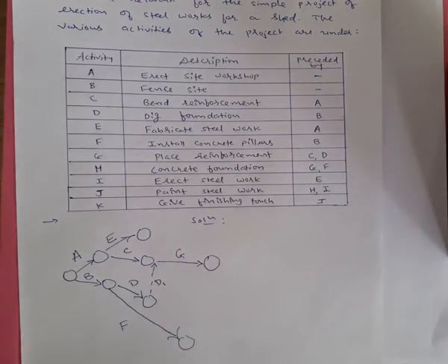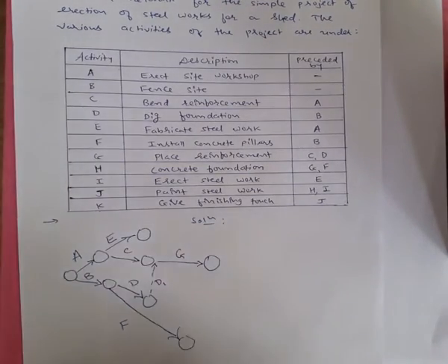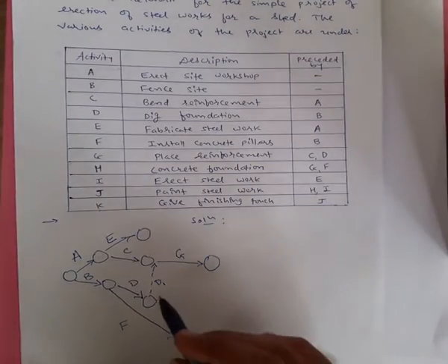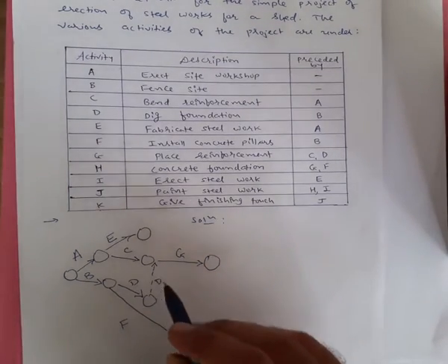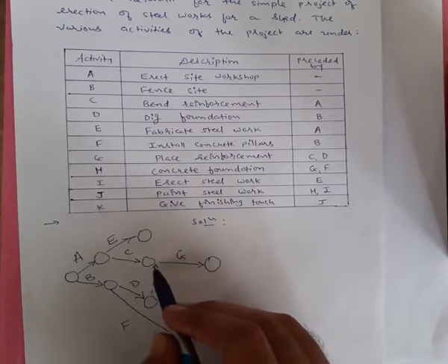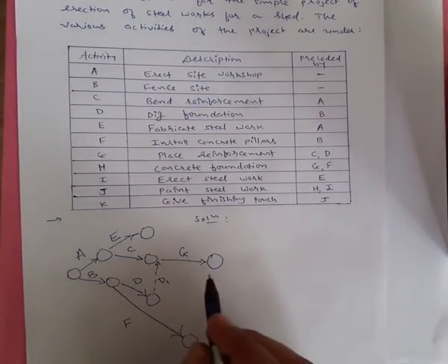So we are joining these two activities. It does not consume any time. So we are joining C and D with the help of a dummy activity. This means after the completion of C and D, activity G can be started. Now